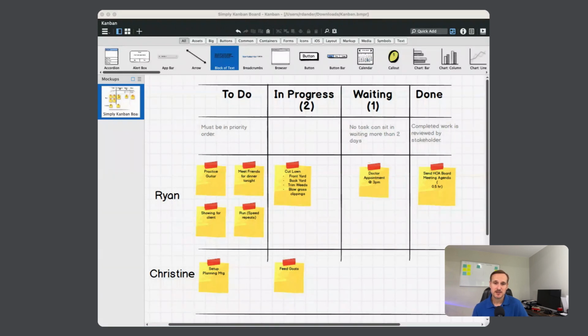And less typical on your swim lanes, but occasionally, an example there might be, say you have two teams. Each team has its own swim lane, team one, team two. Let's call them that for simplicity. Maybe team one, you only want to route issues or customer complaints to that team, because that team's charter is to address issues and resolve them and come up with solutions. Whereas maybe team two is a development team, a new feature development team. So your process guideline on that swim lane for team two would be that work only related to development and only related to new features would flow into that swim lane. So that would be an example of where you'd do a swim lane policy.